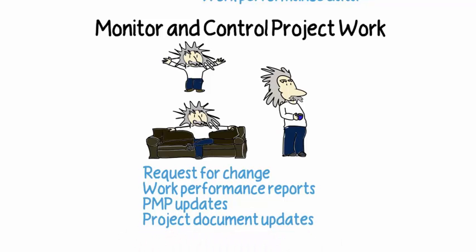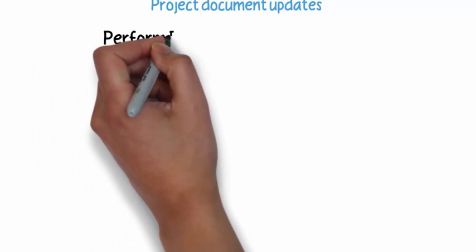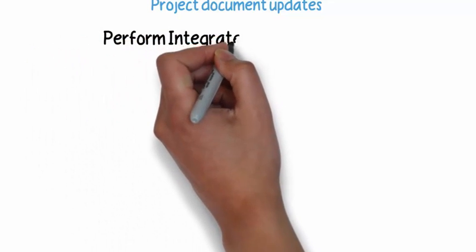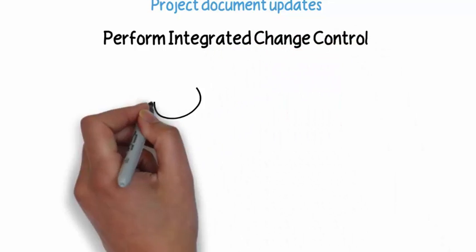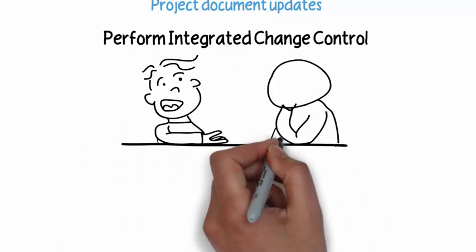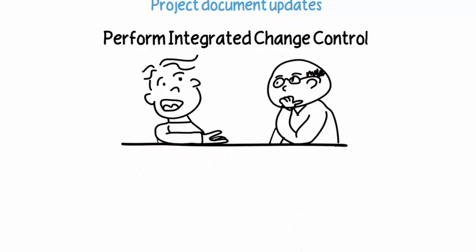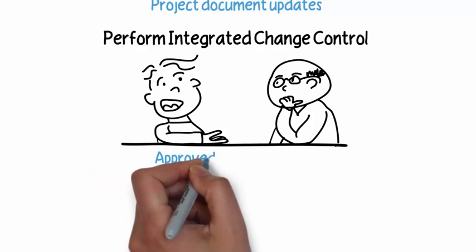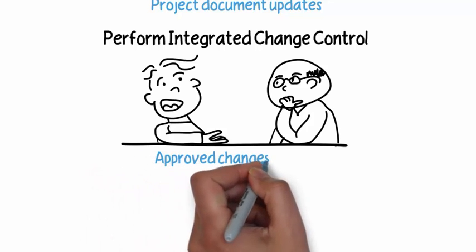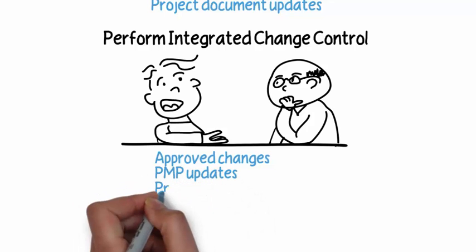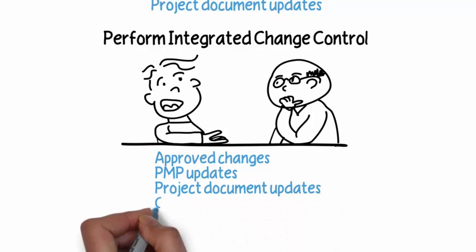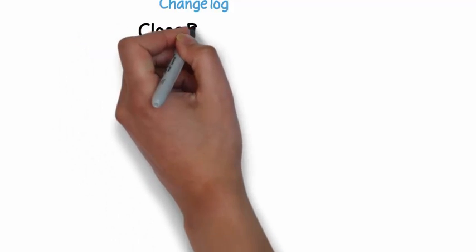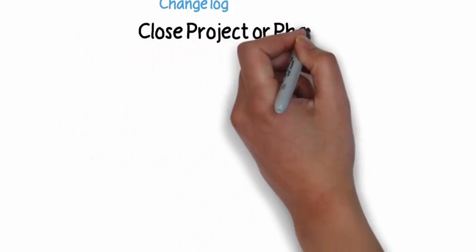The last process we're going to talk about in integration management — which sits in the monitoring and controlling process group — is perform integrated change control. Its outputs include looking at those changes and approving or denying them, updating the project plan and project documents as necessary, and maintaining an updated change log.